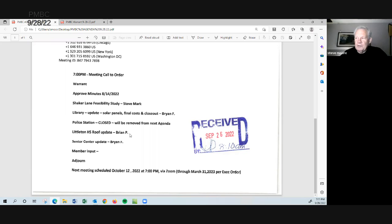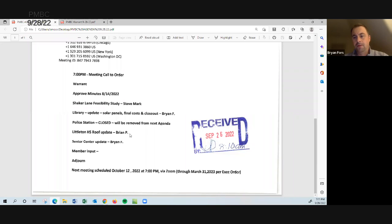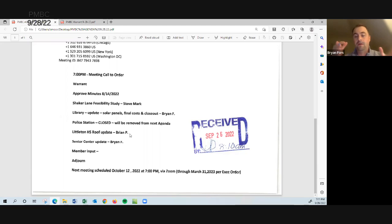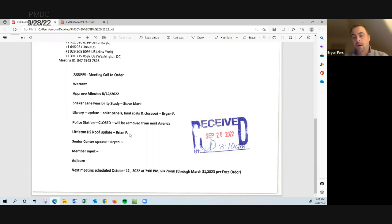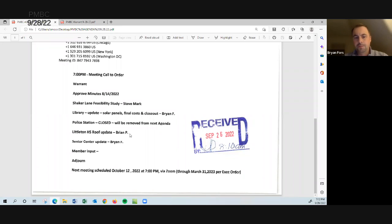So if we do get that bump up, what does that do for us dollar wise? I don't have the exact figures, but I believe it was to the tune of 20 to $30,000 more is what I believe it was. Yeah. And that would also help offset some of the overruns from the additional solar project, the Delta between what the actual grant was and what the total project budget was for the solar. There was the small Delta there. So, yeah, status quo with the library. It's taken a little longer because of the lead times with this material. But the hope is that we close this out soon.